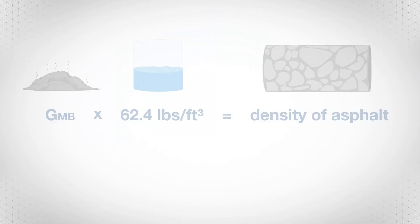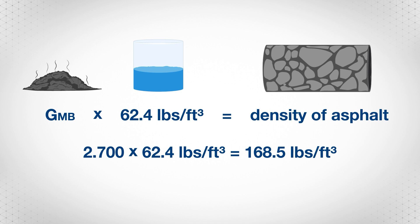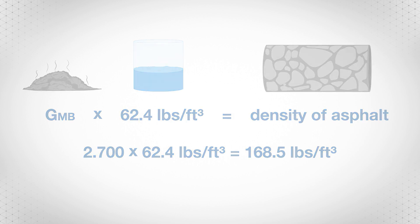To convert GMB to density of asphalt, multiply GMB by 62.4 pounds per cubic foot, which is the density of water. For example, if GMB is 2.700, multiply it by 62.4 pounds per cubic foot. The result is 168.5 pounds per cubic foot.